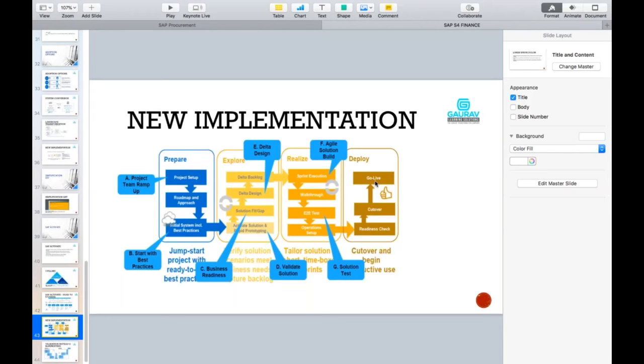Okay, so two important things to understand here, which are new compared to the SAP methodology. Number one, you need the cloud system. Number two, you are following agile because of the situations. And this sprint execution is coming from Scrum, which is again a technique followed in the software industry to avoid rework. So instead of reworking after 4 months, if there is anything, you can do it here itself. So you can save a lot of time.